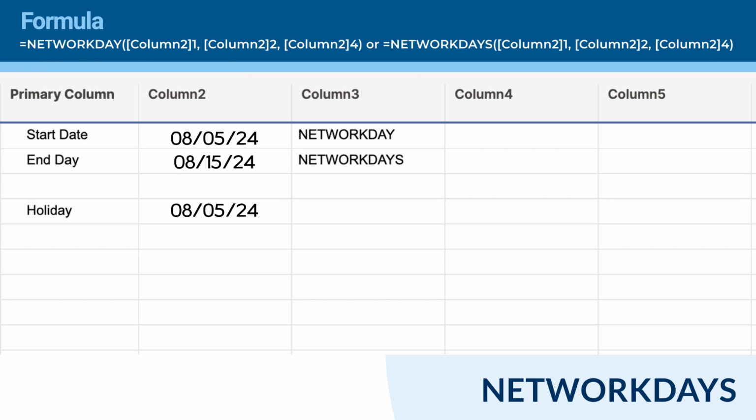This formula will return the number of working days between the start and end dates, excluding weekends and any listed holidays. In this example, the NETWORKDAY function would return a value of 9 days. The NETWORKDAYS would result in a value of 8 days.